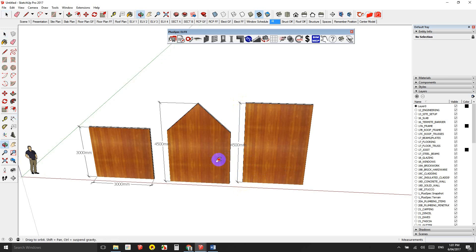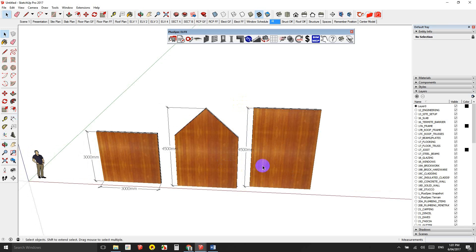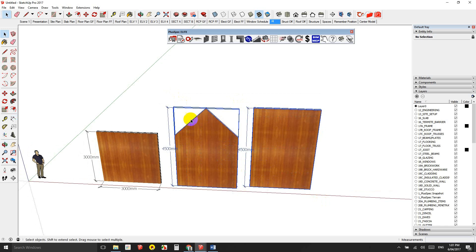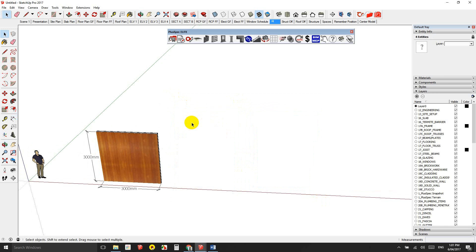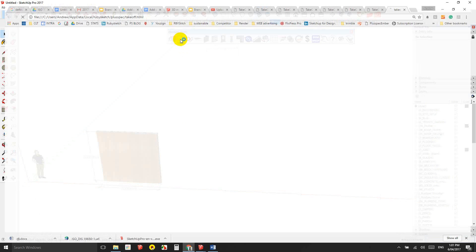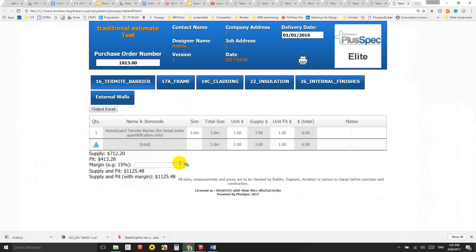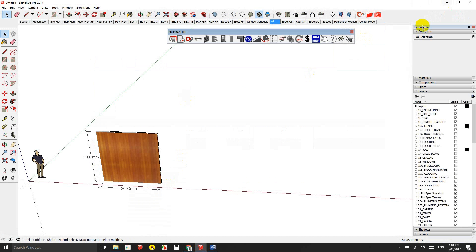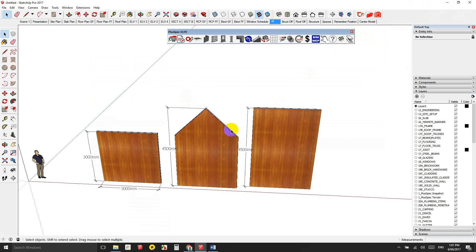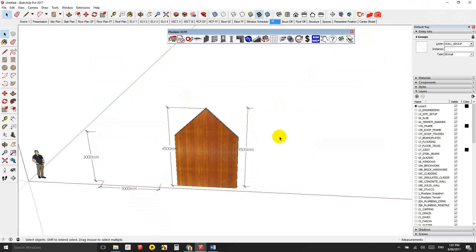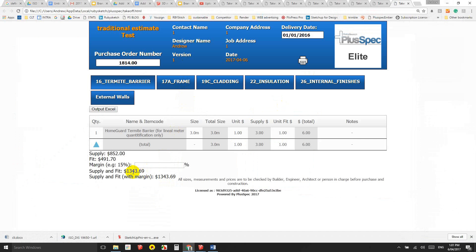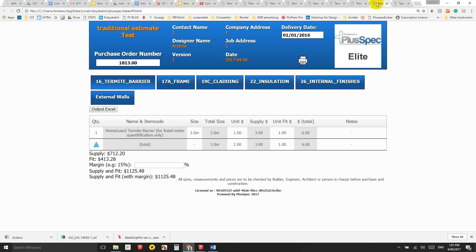So let's see what the prices would have come out without putting a window in here, just on the wall. I'm going to hide these two. I'm just using a shortcut, hide. So this would be traditionally how line drawing software works. And I'm going to do my takeoff. And it's the same as I had before, $1,125. I'm going to go and unhide. And I'm going to hide these two walls. Cause this is how PluSpec would do it. And I'm going to take it off. And I have $1,343. So we can see that there is a discrepancy of $200 just in one wall.